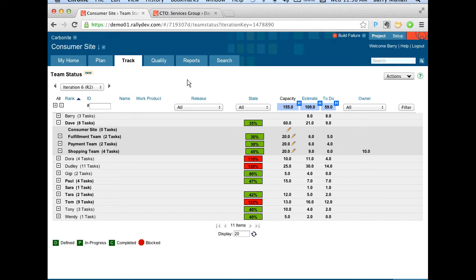If we added a new team to consumer side, their current sprint is, say, Sprint 6. If you had a brand new team forming, we'd bring them in at Sprint 6 or Sprint 7 rather than starting them off again at Sprint 1. That way you have almost like a common calendar the organization can align to.